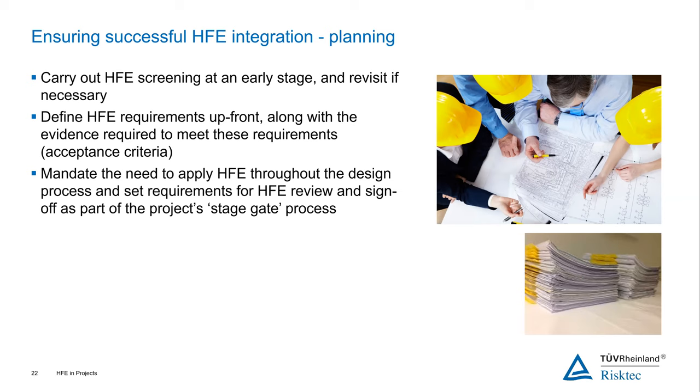So that's what we need to do. How are we going to satisfy ourselves that we've met that? What do we need to do to show that? And mandate the need to apply HFE throughout the design process and set requirements for HFE review and sign off as part of the project stage gate process. So build it in, that's going to be a key requirement to actually move through the project. There are going to be HFE requirements that need to be met.